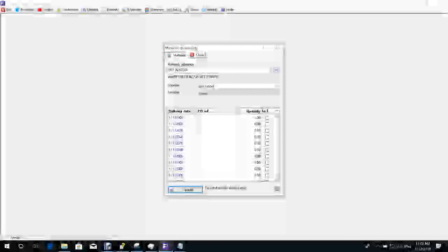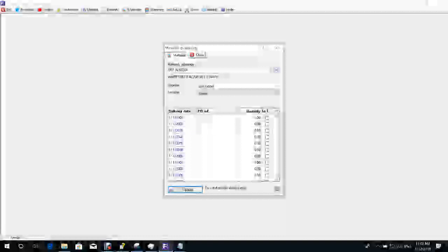So when you create an order in the system, it will read all the materials in your bill of materials, and it will read as well the lead time against that material. It will show you, like Jake showed you when we were back in the UK and the system walked through, the worst case scenario. It will show you whether the material is available, whether the material is in stock or is expected to be delivered. It's going to show you all that information if you add a lead time against the material in the system.